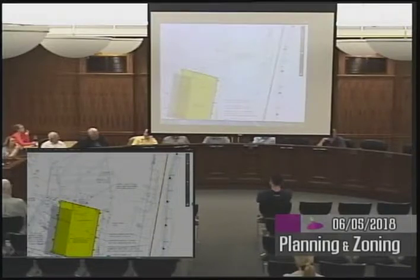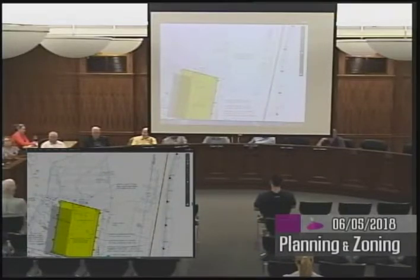Yes, I just have something to confirm from the materials that were presented to us as well as your oral presentation, and I have a question following that. My understanding from the materials is that you were in quite a rush to get this accomplished this summer, in order that you will be able to construct this new structure ahead of potential proposed DEEP regulations, and that the anticipation is that those regulations, if they are effective before the structure would be completed, would essentially outlaw the structure on the site. So we have been led to believe that, yes. Okay. So you have an urgency to replace this.